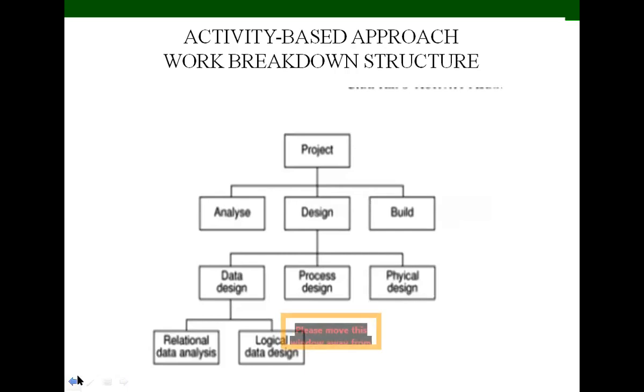In a WBS, we identify the main or high level tasks or activities required to complete a project. Then we break each of them into a set of lower level tasks. When preparing the WBS, too great a depth should be avoided, as it will result in a large number of tasks that will need to be managed.